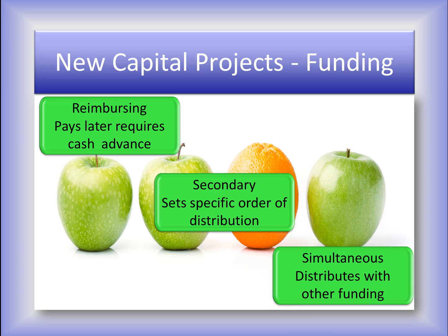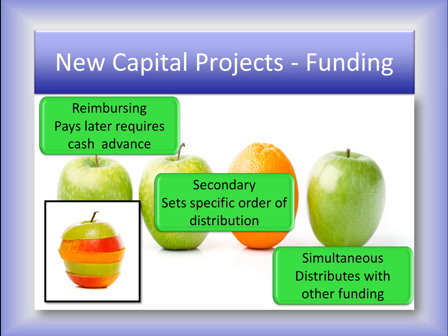So when the contractor submits a bill for $10,000, it's approved by everybody, and the amount is divided between the funding sources. For example, 50% is the grant, 30% is the loan, and 20% will be your matching cash. Each funding source provides a portion toward each approved payment request. So you can see how a project can be very different. You need to understand each funding source and how it's going to flow into the project.